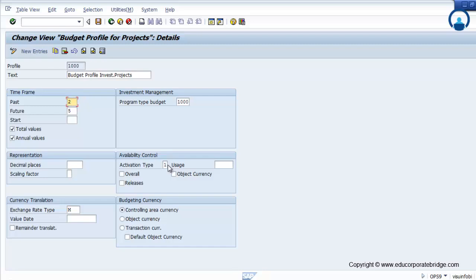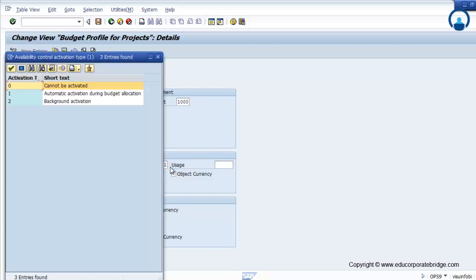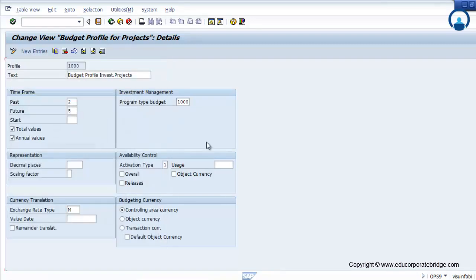The activation type determines whether the budget is automatically activated or uses background activation. As soon as you put the budget, the system will activate the availability control — whether it is on an overall basis or a release basis. Release means once you create the budget you have to release it, then only the availability control gets activated.